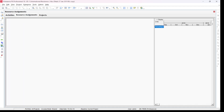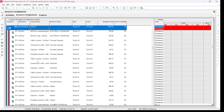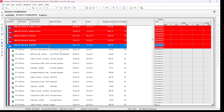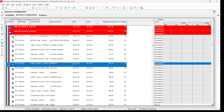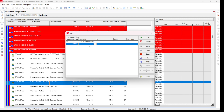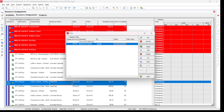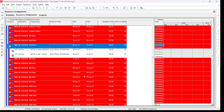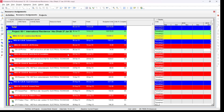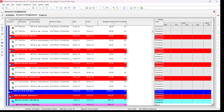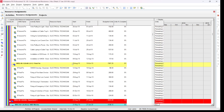Similarly, you can filter by resources. The resources are assigned to all activities — for example, the third floor contains many resource types like electrical technician, concrete, carpenter, steel fixer, etc. If you want to see only the electrical technician, go to the filter again and say 'Resource ID Name is equal to', then click to select from current project resources. Select the resource you want — for example, electrical technician — click apply, and it will show only activities assigned to the electrical technician. Press Ctrl+ to expand and you can see all electrical technician assignments shown.